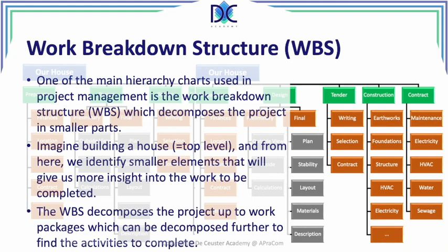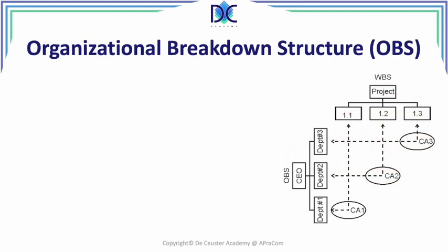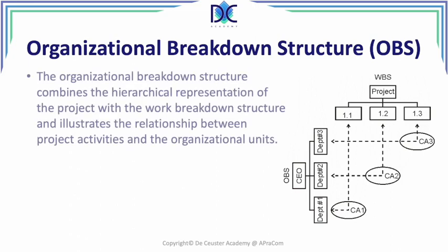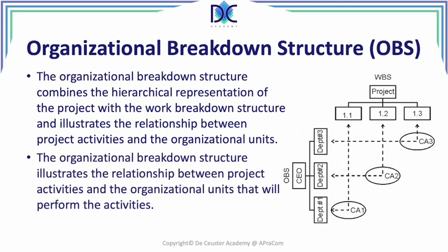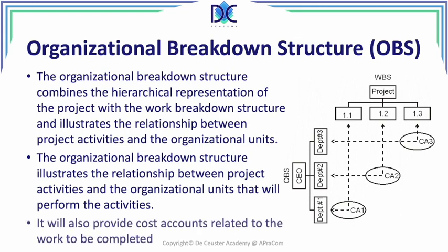The organizational breakdown structure is another hierarchical chart, and here we combine the hierarchical representation of the project with the work breakdown structure, and it illustrates the relationship between project activities and the organizational units. The organizational breakdown structure illustrates the relationship between project activities and the organizational units that will perform the activities. It also provides cost accounts related to the work to be completed.